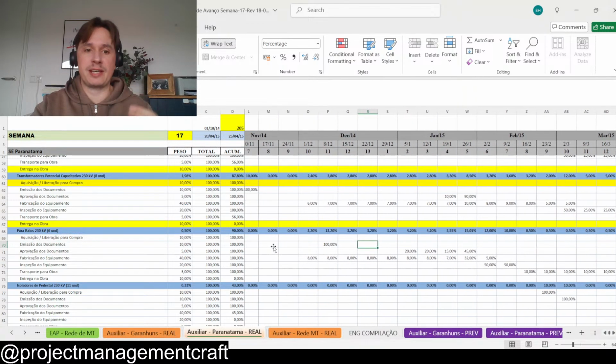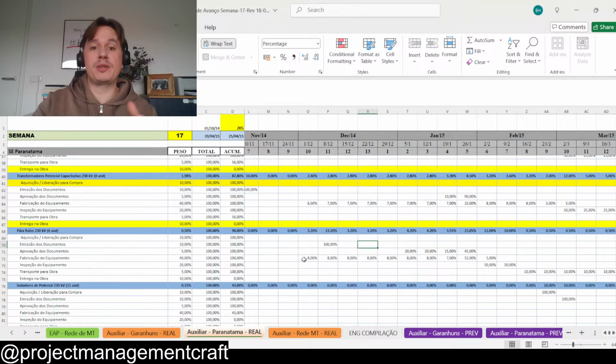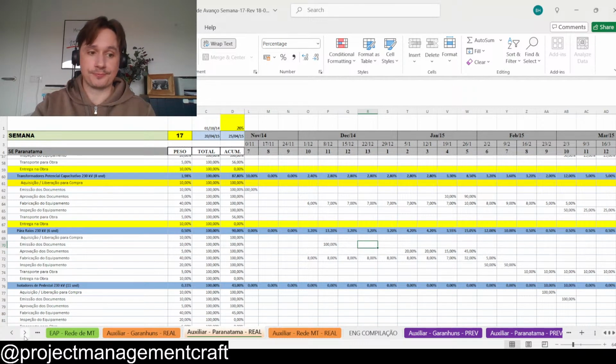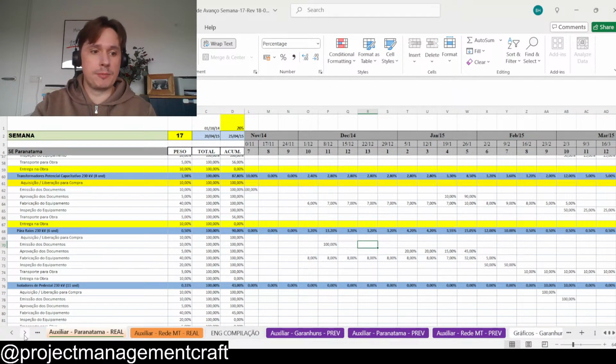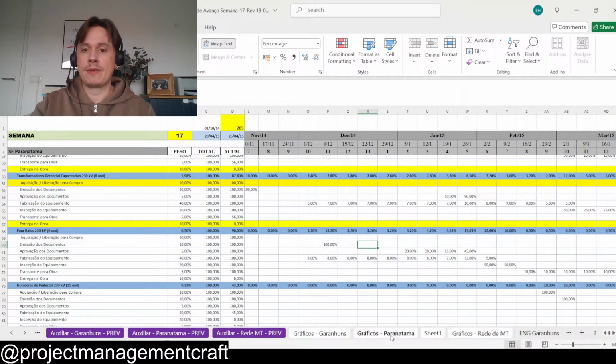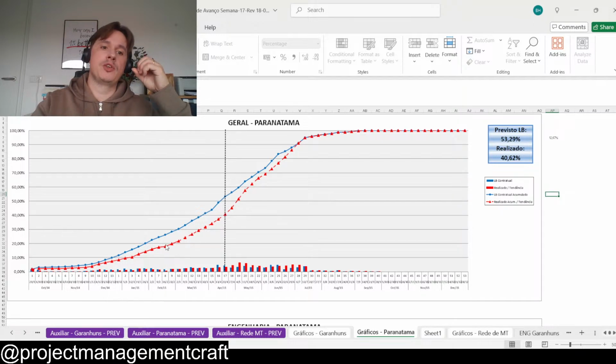And based on this task, you're going to get a calculation also, depending on the week where you're going to calculate. You get a calculation of how much progress based on all the tasks that are being executed. That also is going to create the graph. Let me go back to some advantages of the graph that you see here. If you look into the graph, you can see very easily that you are below the schedule. That's why graphically it makes it very easy.